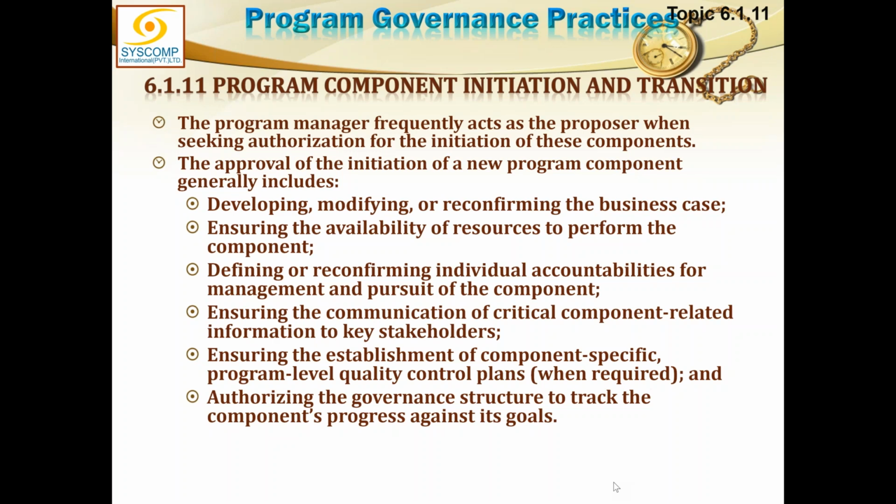Authorizing the governance structure to track the component's progress against its goals. How are we going to report whether a component is progressing well or not? The governance structure which we have provided to the project or the component actually describes how and when they have to report upstairs to the program.